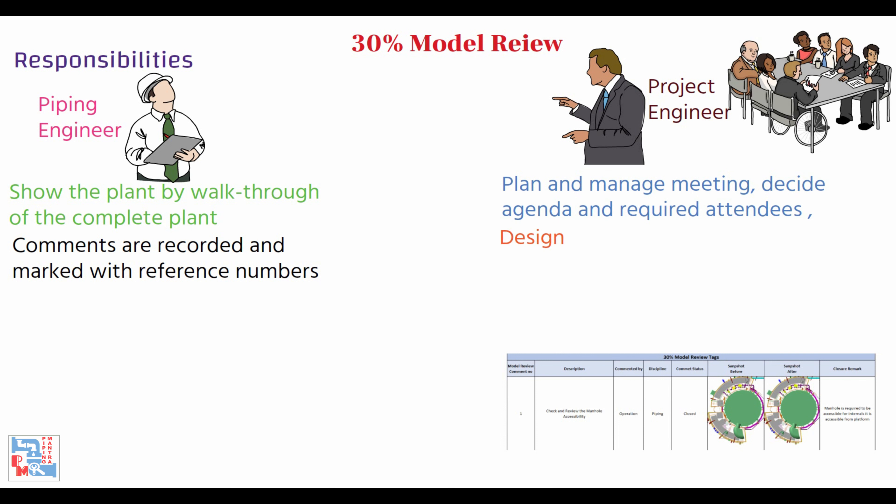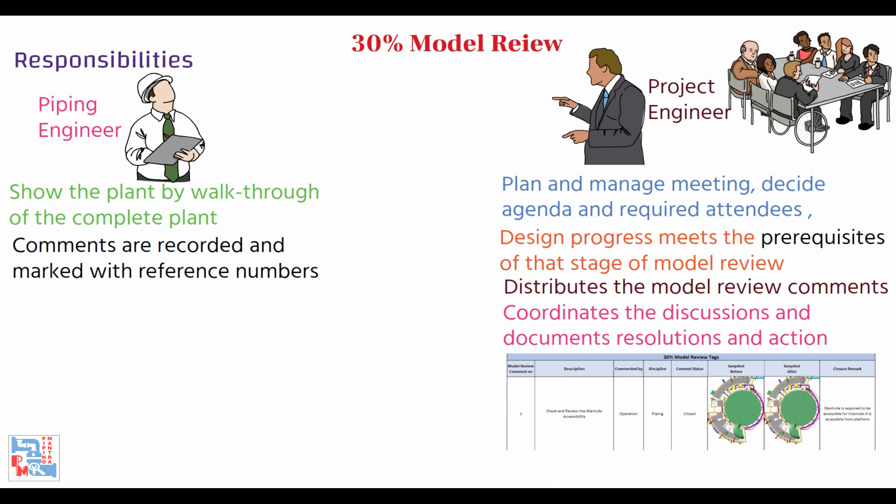The project engineer will plan and manage meetings, decide agenda and required attendees. He ensures that the design progress meets the prerequisites of that stage of model review. He distributes the model review comments to the attendees and coordinates the discussions and documents resolution and action items between different stakeholders.